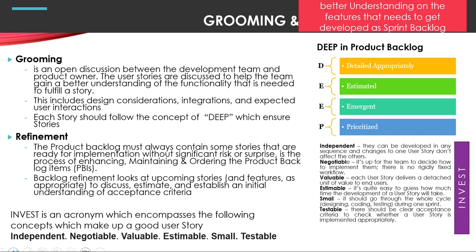So INVEST is an acronym which emphasizes the following concepts that make up a good story. It should be independent, not depending on another user story. It should be negotiable. We should be in a position to handle it properly. It should be valuable. The end result should be valuable to the end customer. We should be in a position to estimate it. It should be small, not too long. And finally, it should be testable. So it's very important to have the grooming and refining session.